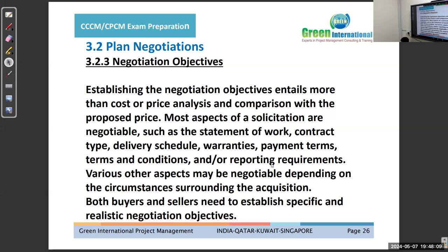So as I have said earlier, we have to select our objectives, and mainly it will depend on the price range in which we are looking to negotiate and to finalize. That price range and that figure we have to select in our mind, and on paper also, right? And we can hold a pre-negotiation meeting with our team members, internally, before sitting with the other party.